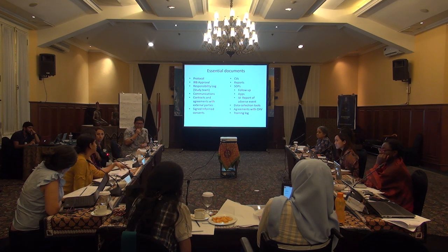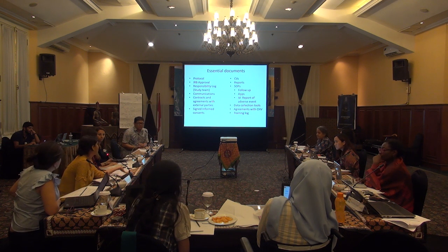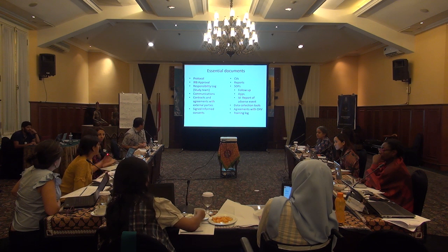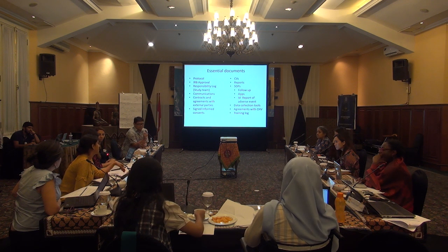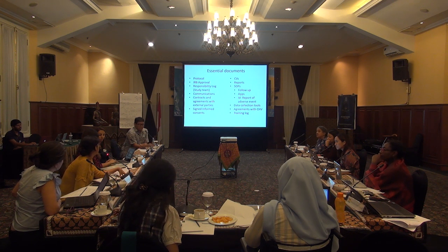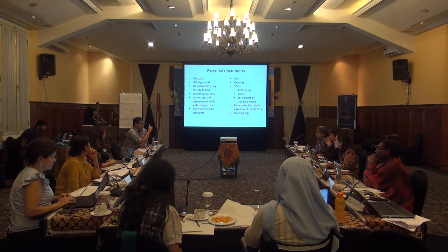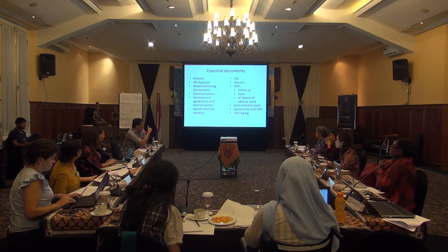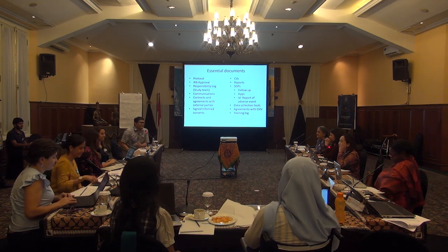Okay, so we had to make an amendment to the protocol, because the initial plan was to go straight to using the apps, because they were developed before in another project, and we thought they were ready to scale. So we were just planning to adopt the technology. And what we found out is that no, they needed to be adjusted. So we had to design the paper forms and start collecting the data on paper until the apps reach the quality we need for analysis. So for now, it's paper records. So another document, protocol amendments, should also be put there, right? That's something we have to add.